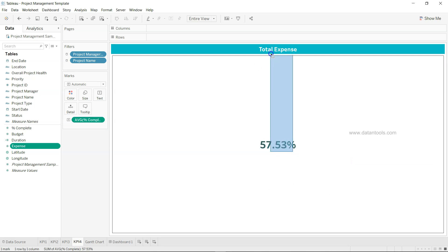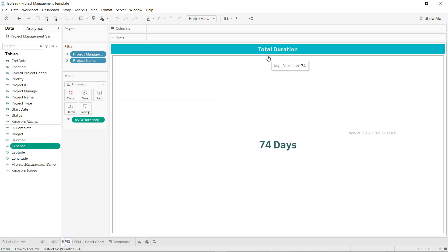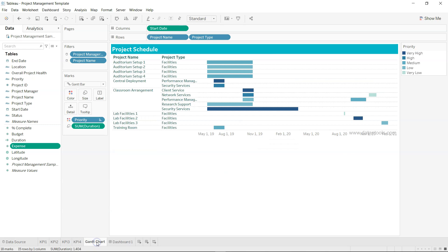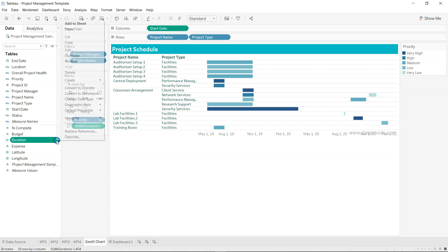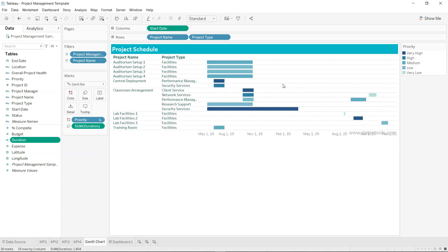KPI 4 is average percentage completion, formatted as a percentage using the same process. Now for the Gantt chart — I've taken the start date and project name, changed the mark type to Gantt Bar, and added duration on the Size shelf. Duration is a calculated field: end date minus start date. It can be as simple as that or more complex depending on your scenario.